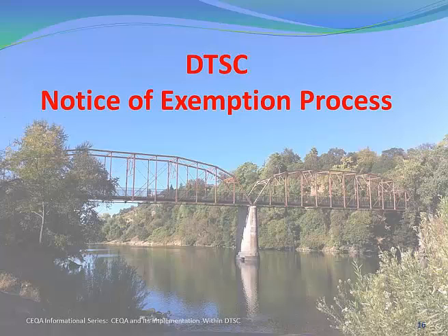But when we have permit renewals for existing facilities, we are not going to be able to just issue NOEs. In order for us to withstand legal challenges, we are going to need to have evidence in the record for how we came to our conclusions. So even if we wanted to do an NOE, we're still going to have to do some analysis in order to support that NOE. However, it's important to remember that if there was a negative DEC or an EIR in general, we are not going to do NOEs for permit renewals.